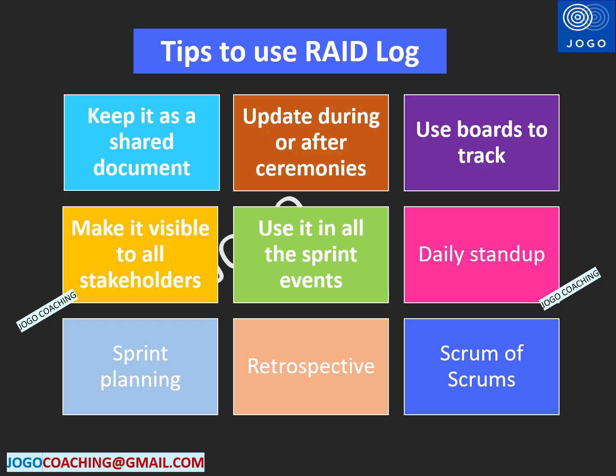The third one is to use boards or Kanban reports and track RAID items across the statuses. The fourth one is to make it visible to all stakeholders for shared ownership, so that the people who are depending on something and the people who own the dependency will work together and have visibility about all things, including risks and issues as well.